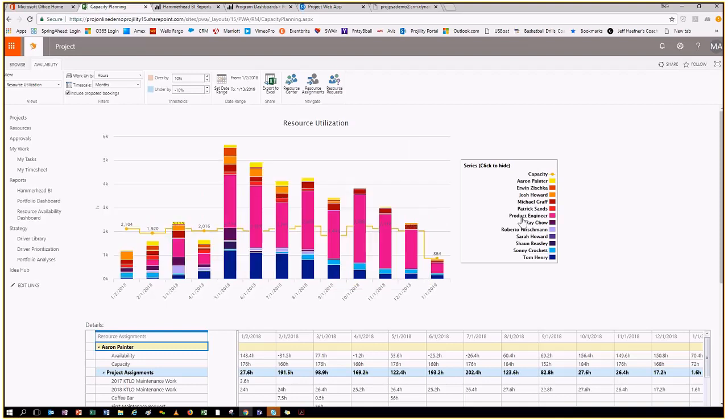We can also add this role called a product engineer. It's called a generic resource to say, okay, if we do all the work that's currently proposed in our pipeline, what does that look like? And you can see it's going to push us way over what we can do through the rest of the year. So what that means is we have an active pipeline of potential projects that we're going to have to determine what are we going to staff.